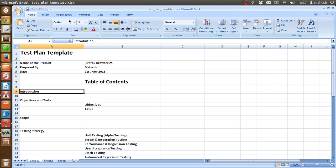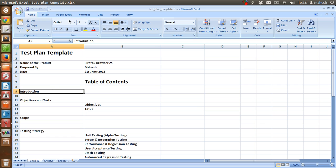The objectives of test plan are to identify the items that are subject to testing, to communicate at higher level the extent of testing, to define the roles and responsibility for test activity, to provide an accurate effort estimation required to complete testing as per the plan, to define the infrastructure and support required.